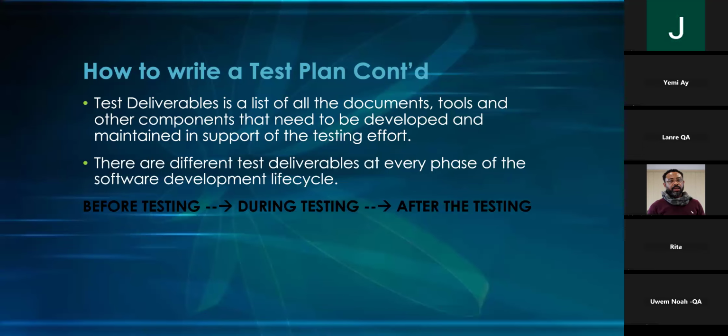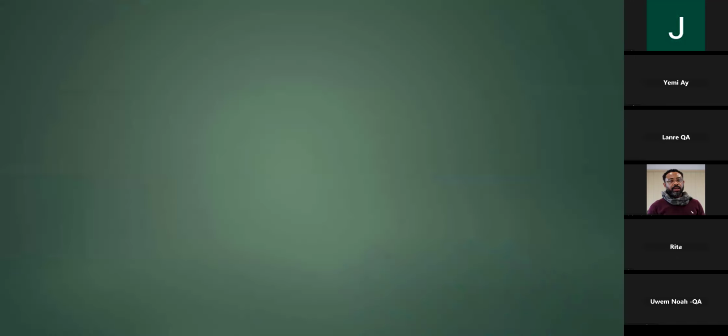So these are phases. Before your testing, you do all your testing prep. Design a test plan first, design the test cases, make everything ready. Do you have the environment? Do you have all these things ready? Accesses have been given to all team members. During the testing, we are executing, carrying everyone along, giving them a daily report of whatever has been executed. Do we need people to come in? Yes. Make it clean. After the testing, prepare a test completion report.